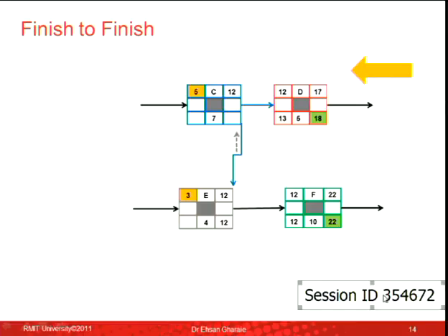Now, let's look at the late finish of activity C, this little box here. There are 2 arrows going backward into that box. One arrow going from here, 12 can go there. And another one from here. The start of D can be the finish of C. So another option would be 13. Between 12 and 13, which one should I choose? I choose 12, and I move on.